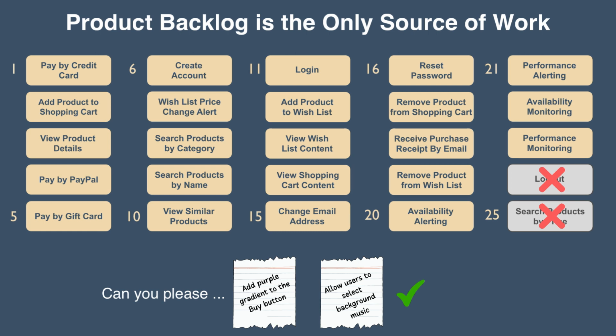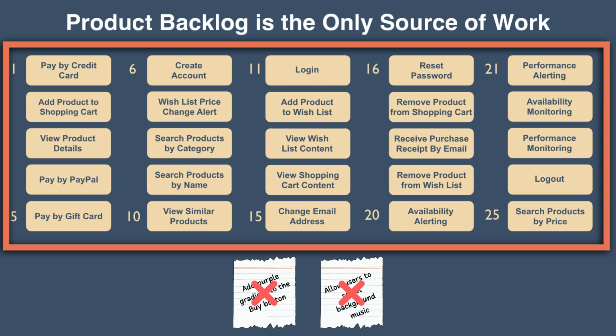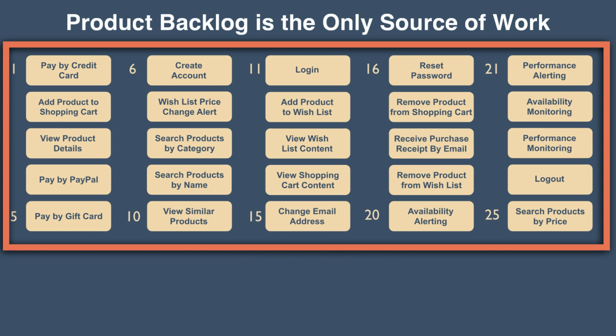Both of these scenarios happen because of good intentions, but regardless of that, they often create harm. To prevent these problems, the product backlog must be the single source of work undertaken by the Scrum team, as stated in its definition. If a feature is not in the product backlog, it cannot be worked on. If that rule is followed, no work is done on the side, and all good or not so good ideas from leaders or developers or anyone else are assessed before any work starts. If they are good and worthwhile doing, they will eventually be included in the backlog and completed.